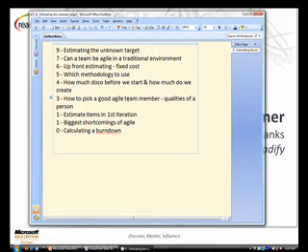But if you say, we did a previous project around a similar sort of thing, and it depends if you've got history. If you've got no history at all, you've got to take a different approach. But if you've done an agile project before and you've used points before and you're using the same technology stack, so there's not too many unknowns, and your team is roughly similar to the team who did a previous project, you can take the point sizes and how long it took to get through each point from a previous project and apply it as a rough guide to the next one. The saying goes, the best indicator of tomorrow's weather is today's. It's the same with projects if you've got the same team, same technology stack.